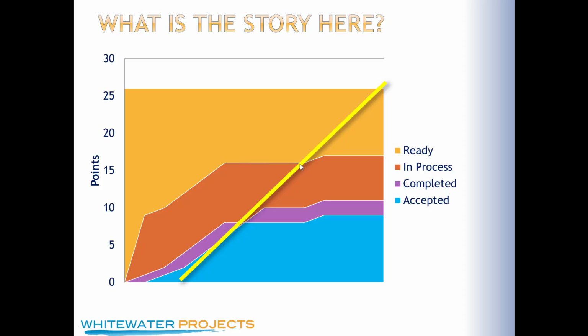This is actually pretty accurate to a burnup or a cumulative flow chart that I received and was tracking on a project that I had, where something broke here, and then they did a little bit more work. They got one more story delivered, and then right about here, the lead developer gave notice. So they were just emotionally shot, and to the end of the sprint, they didn't get any new work done. It was an emotionally difficult time for the team.